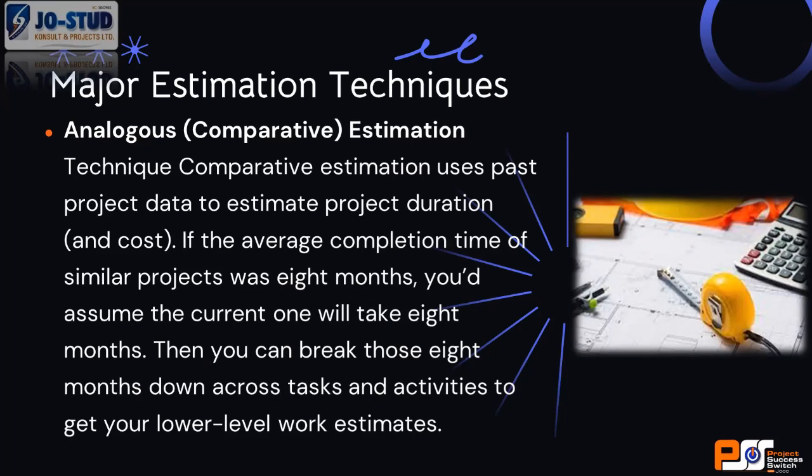Also, the project's conditions have to be similar. For example, I did the project between Abuja and Nasarawa State, somewhere around that area, and the soil condition, the land is relatively flat, it's a bit rocky, and things like that. Once I confirm that Mr. Wesley's site condition is similar to my own, it's easy for me to just estimate.